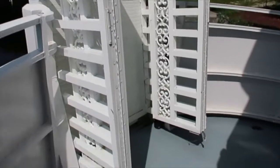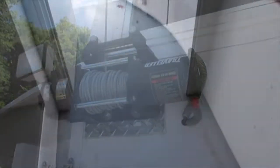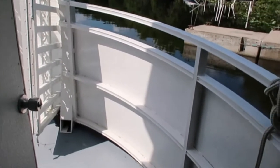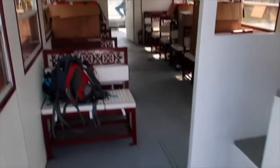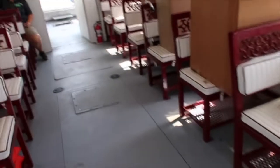It's a cutie. It's very hot here. Here's our loading gate — there's our gate and it goes to a winch. The winch is completely exposed, so I am recommending some grip tape. And then on all these spots that are trip hazards, we're going to go with some yellow paint, probably some handrails over here. We've measured out all where the wheelchairs go to make sure how we're going to accommodate people with disabilities. We're just working through a punch list. We came across an engine compartment that was full of water and the bilge pump is not working. We realized the batteries are dead, so we're probably not operating today. Probably going to move the boat somewhere where we can charge the batteries, but we are working through our punch list and figuring out how to make it a safe vessel.